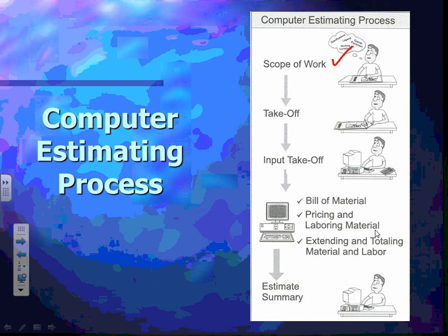The scope of work, Karen, for the commercial project is 12,000 square foot. We're going to do power and lighting and low voltage takeoff, complete wiring and devices, including quotation for the fixtures, which I already put in the software for you guys, right? So that's what the scope of work is.